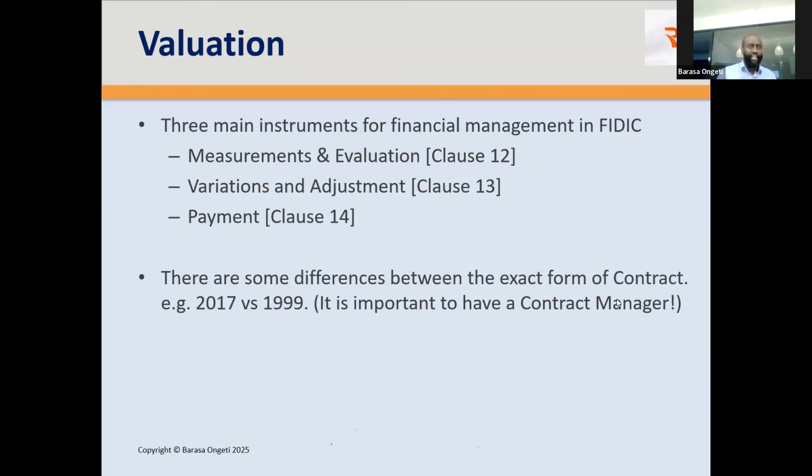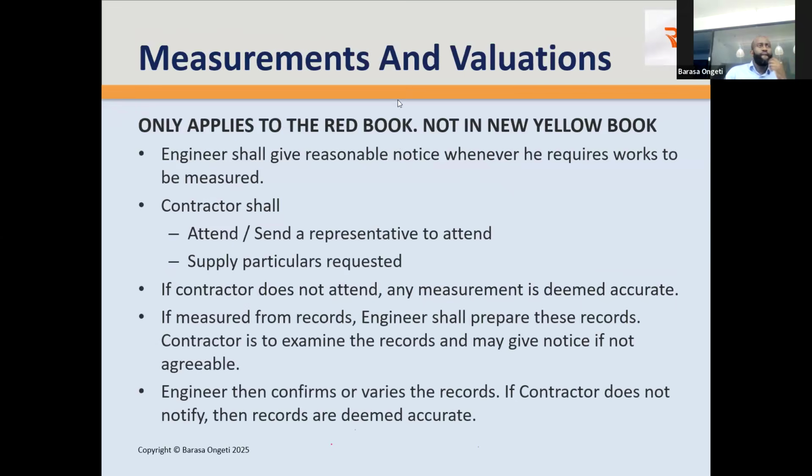It's important to have a guy like myself, a contract manager, to look at the differences because, yes, you know the principles, but there are very slight differences which impact how the valuation is done. Now, measurement and valuation only applies to the red book, again, because we've said it's a measured contract, so not in yellow book. This is clause 12, okay? Clause 12 applies to the red book.